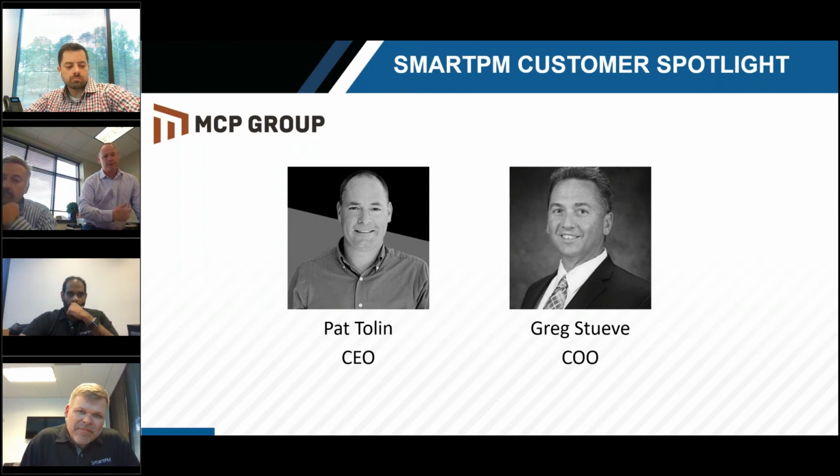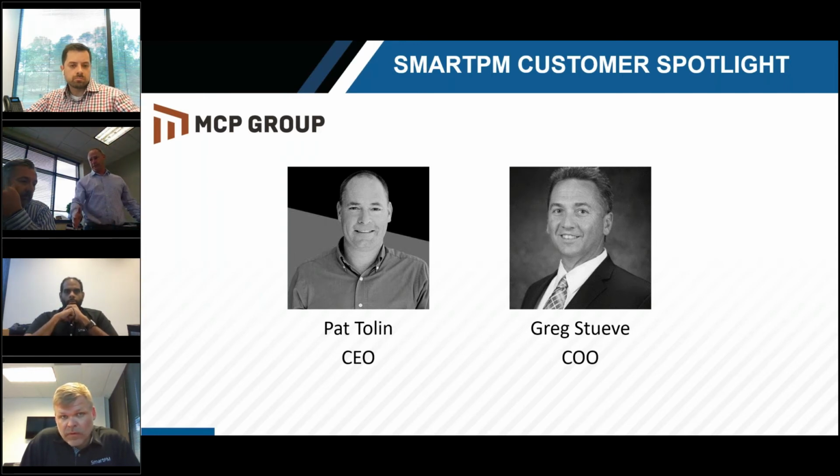You've got too many constraints. You're missing logic. That's the biggest thing to me. I mean, you can't be missing logic. So it's helped our PMs, and I think we're getting there. I would say we were probably a 4 if I had to guess. Yeah, 3.5 to 4. And before we met you guys, we were struggling.